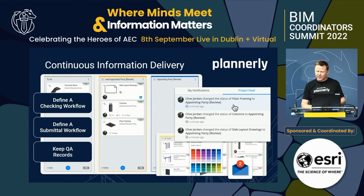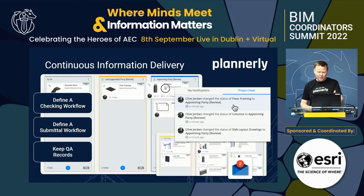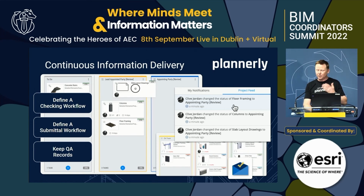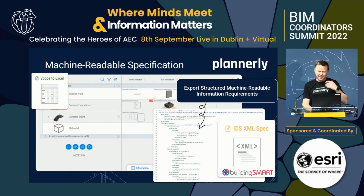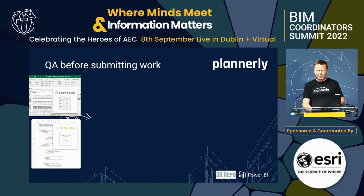And the verify side of things is continuous delivery, lean concepts, understanding the tasks down to here are columns, they were assigned to, it looks like me, on the structural team. And when I've done with them or I want the appointing party to review them, I can drag and drop them and it will automatically notify them that they're ready. We can also use the really structured machine-readable rules to validate, whether it's using an output to Excel or the IDS XML that we're working with Building Smart to be able to develop and export to other teams in other software to be able to use and validate in that workflow.